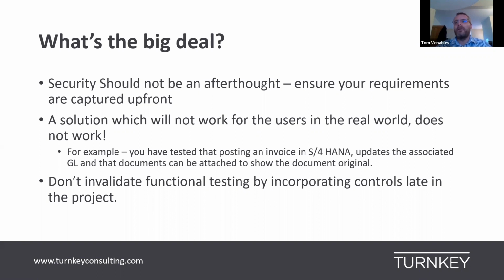So you need to understand that the solutions that you're designing work for a real world scenario. And if you incorporate those controls late in the project, if that's after test cycles of functionality, part of the issue that you've got is that you're going to invalidate test cycles that went before it, because you may have passed all of your functional testing with your SAP all profiles, but then it comes to a UAT cycle and it turns out that those processes no longer work because you've applied the correct restrictions to those users. The testing that went before is invalidated, so you have a regret cost because you've got to go back and revalidate all of that testing. And as I said, you may have to redesign as a result of that. So you want to try and expose your requirements early and with equal priority to the functional requirements.